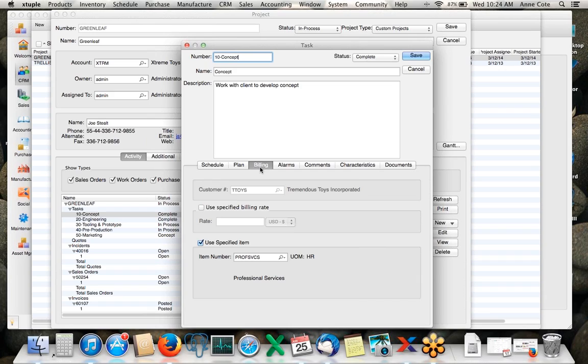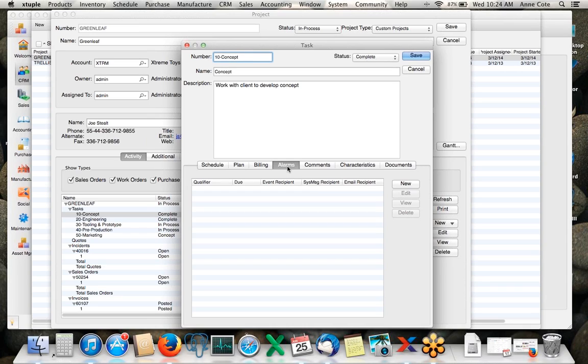So if you were doing a service, let's say you're an engineering company providing engineering services, and you are actually billing time and materials for the project each month, then you would set up a billing rate for the task, and